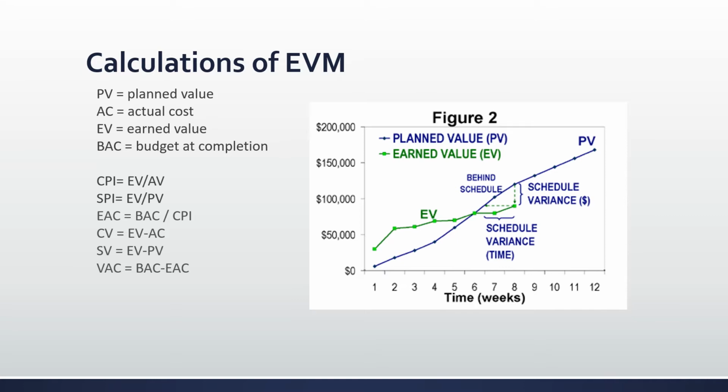Okay. Schedule Performance Index, which is SPI, is the calculation that involves dividing EV by the PV to measure the progress achieved against where you expected to progress at a certain point. So it tells you if you're ahead or behind your schedule. If you're ahead of schedule, then you would have a greater than 1 number, and if you're behind schedule, it would be less than 1. So your SPI calculation is EV divided by PV, which is earned value divided by planned value.